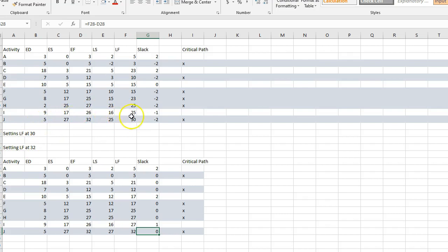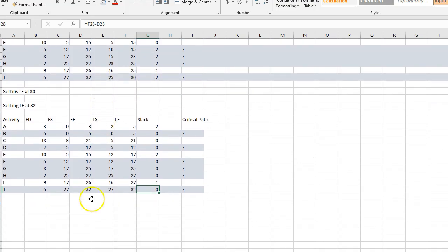So this is the same chart we did where the book says here's a solution, and I just did it to show you those slack times and what we have in there. So I think we're all smart enough to say, hey, we've got 30 weeks. Our earliest finish here, or our critical path, says we have 32 weeks. We can't do it.